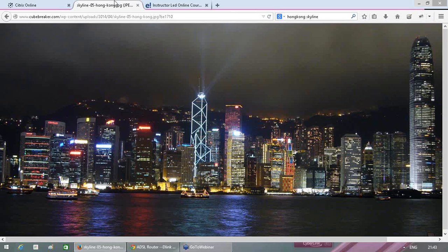India mentioned medium, Mathur mentioned extra large. Then we discussed why it was medium and extra large. Right? And then based on the discussion, we came to a consensus that it was not medium, it was not extra large, it was large. This was a Wideband Delphi. Had I not asked you to think about it individually and discuss it together, it would have been a different technique. Okay? Yeah, clear.